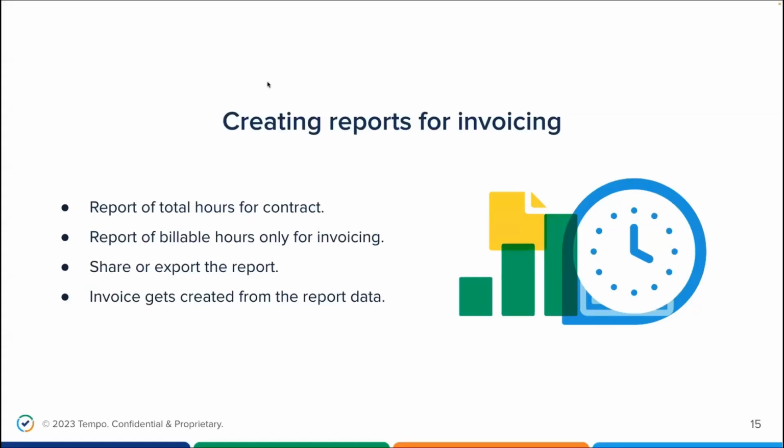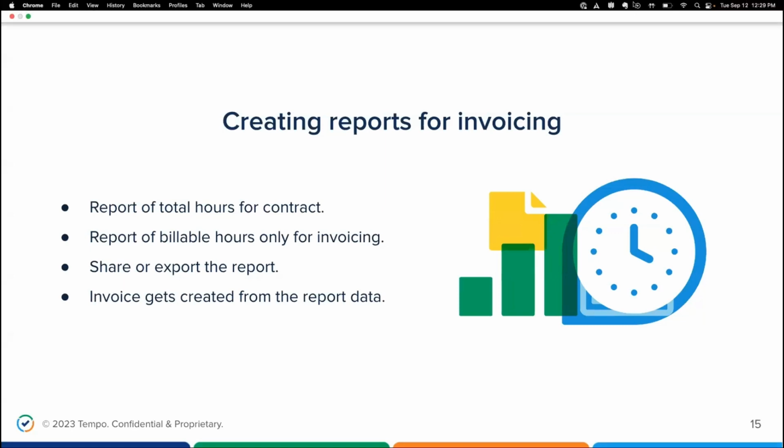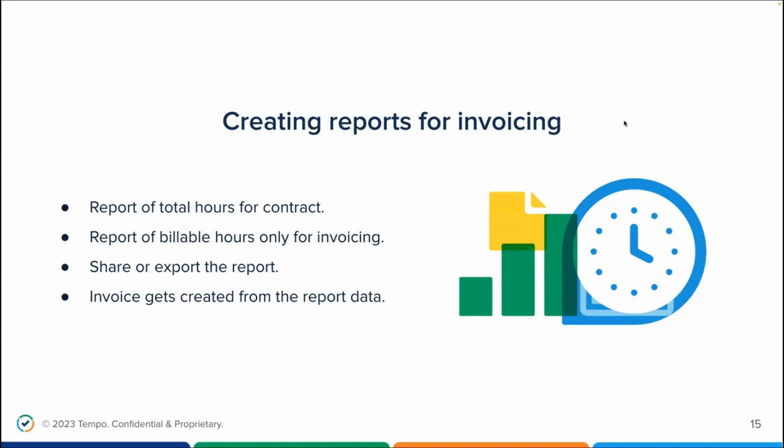All right, so reports are really the end game for billing. You need to know how many billable hours there are on which Jira projects and issues, when they were logged, and by whom. At any point during a contract, such as every month or at each project milestone, the project manager or account manager runs a log time report to see how many billable hours have been logged.